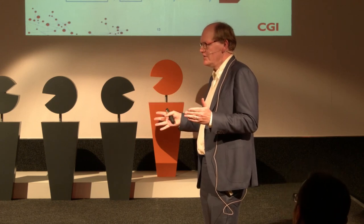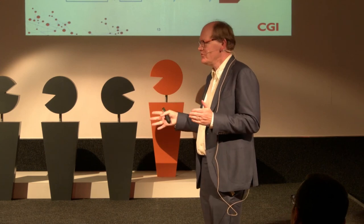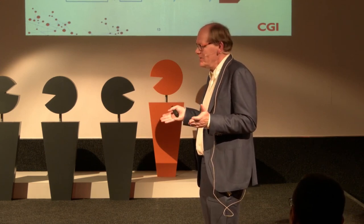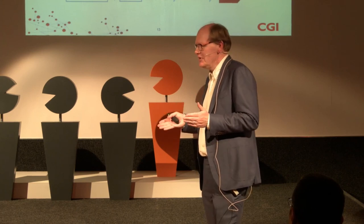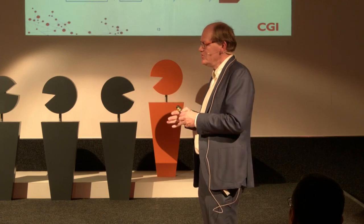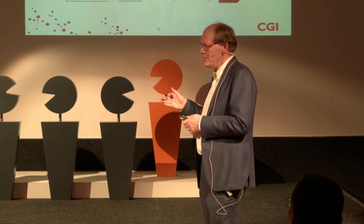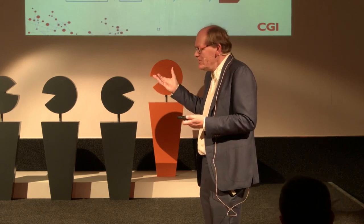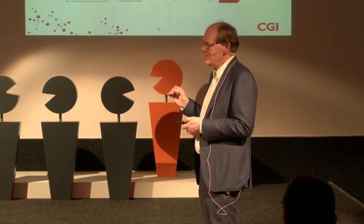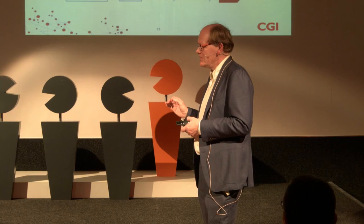Actually, I attended a talk once that was called Zero Technical Debt Software Development. And I think even if you are able to do it, it's not a good idea, because very often consciously making an architectural decision to make a shortcut somewhere is a very good idea to make a deadline. Maybe the debt is less harmful than actually following the full architecture. But you need to reason about it. If you are dogmatic about it, then you are likely to make a wrong decision.